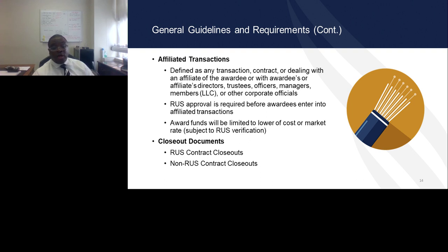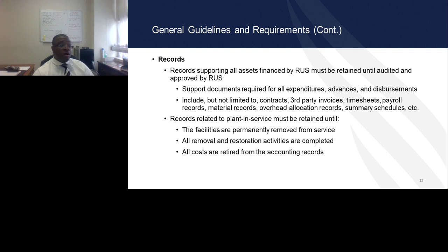Now, for closeout documents, we have standard RUS closeout documents for RUS contracts. If an awardee elects to use a non-RUS contract, then the awardee would have to submit non-RUS contract closeout documents that include certification, similar certifications as the standard RUS contract.